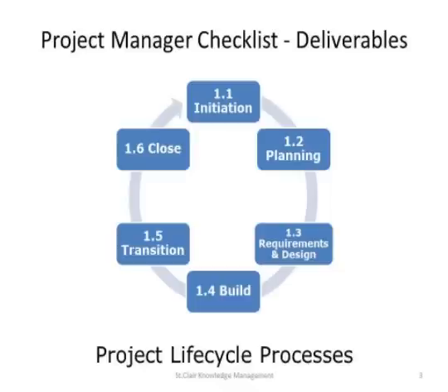Okay, now initiation. What do we mean by that? Project initiation puts in place the definition, funding, prioritization, and resources that are required to launch a new initiative, a new project, a new thing. At the end of initiation, a project, whether it's an IT or business project, is clearly identified and defined, and will have a budget and resources in place and committed to the project. Now, the key document produced at the end of initiation or during initiation is your business case and sometimes your PID, your project initiation document.